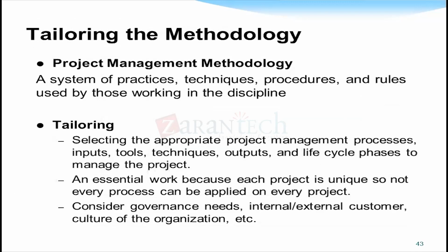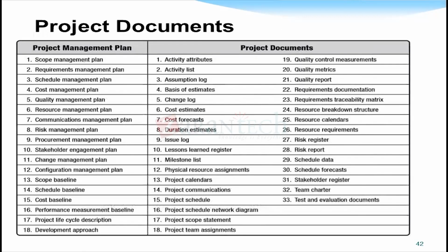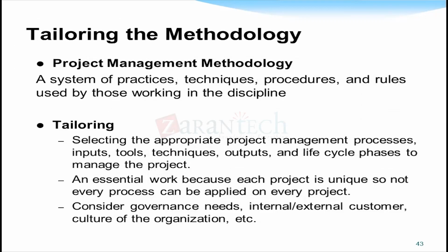Right, and tailoring means based on the project you can customize these templates. Sometimes what happens, long-term projects will follow all these templates. Long-term means like 5 years, 10 years projects. If it is a short-term project, like 6 months or 3 months projects, no need to follow all these documents. Then you will tailor it. Okay, because it's small, so we don't need to follow everything. Yeah, no need to follow all these.